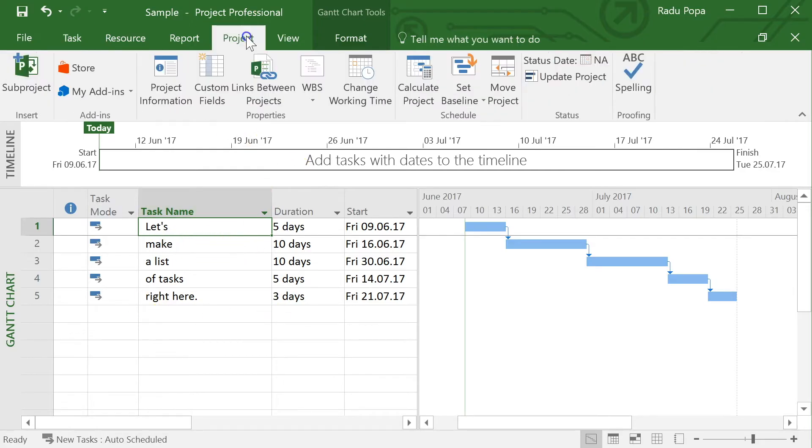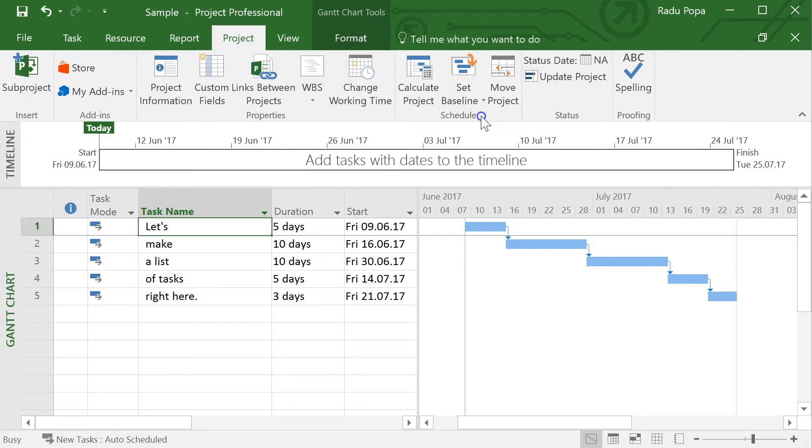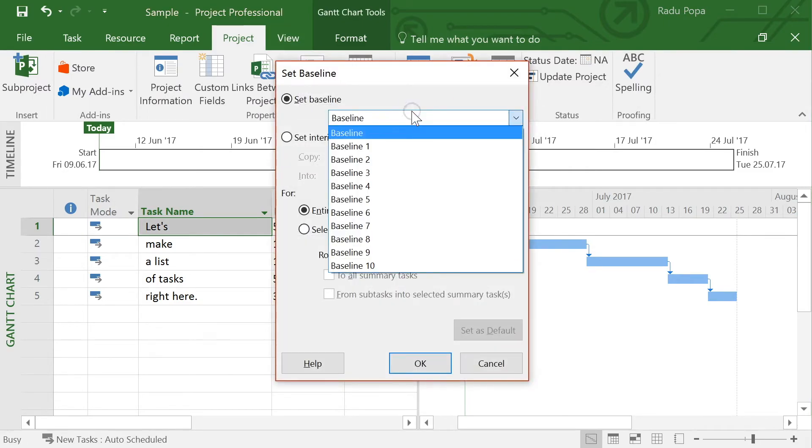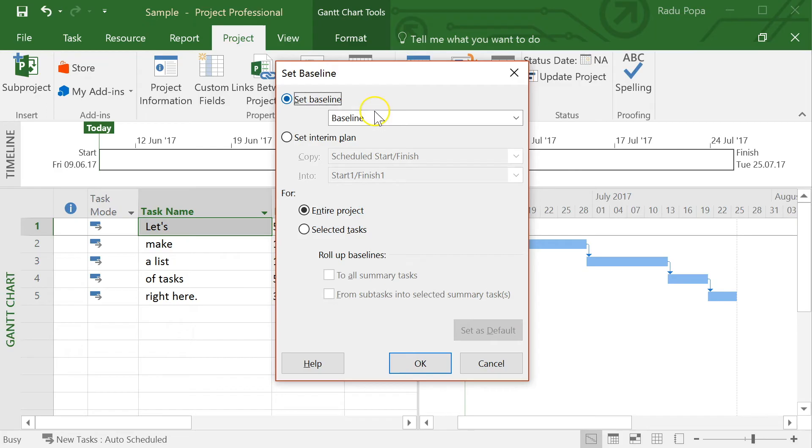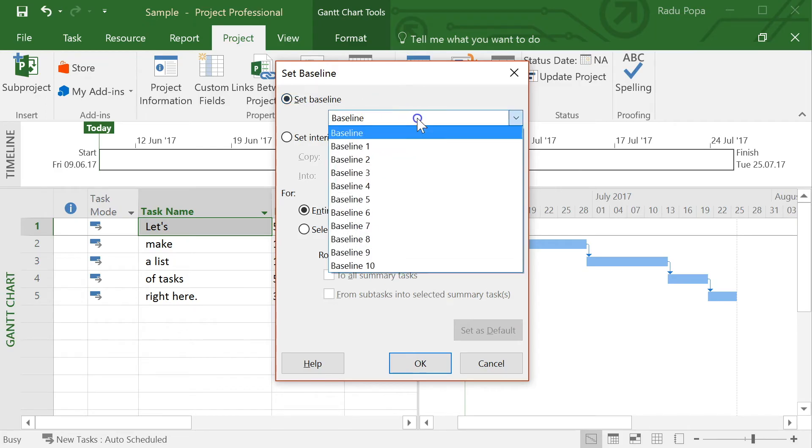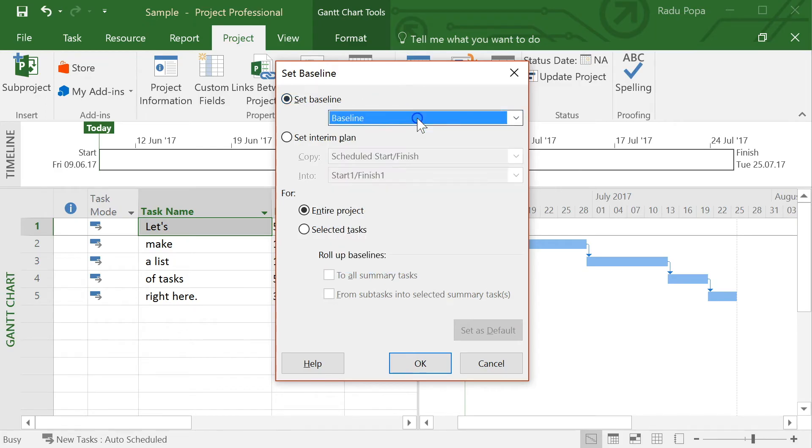Let's go into the project tab and then set a baseline. You can see here that I can set up to 11 baselines and also interim plans. If you're thinking about what is the difference between these two, the difference is that the baseline will save more information.